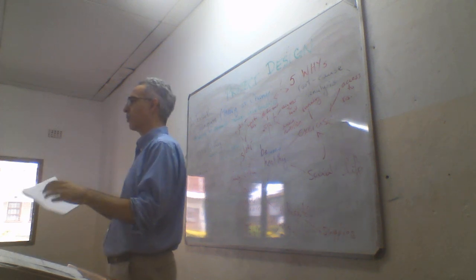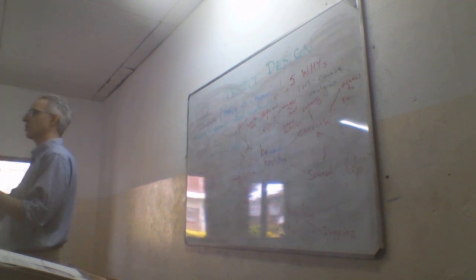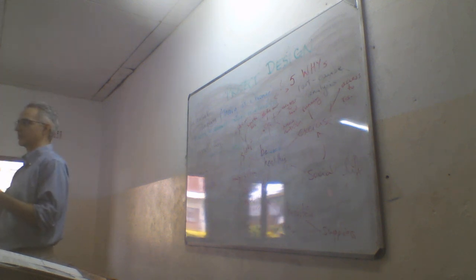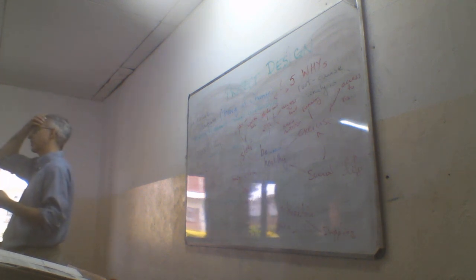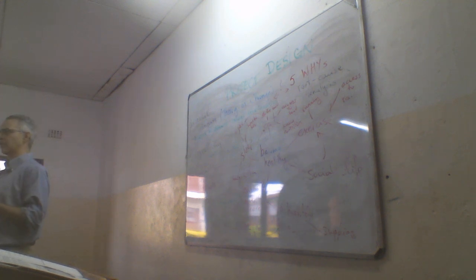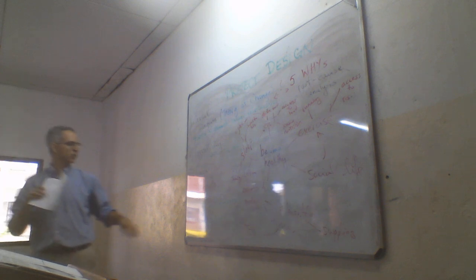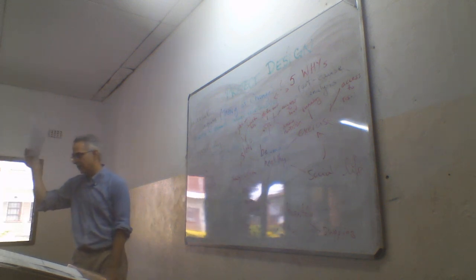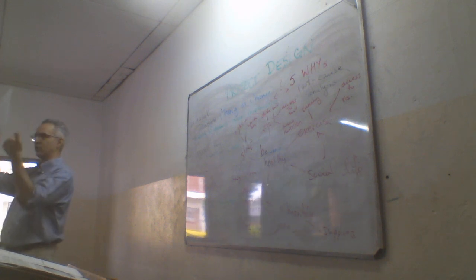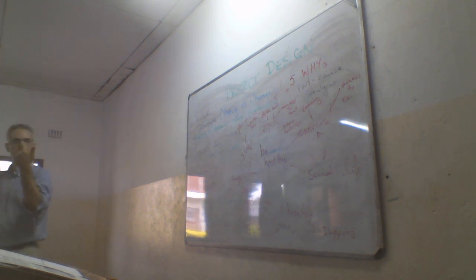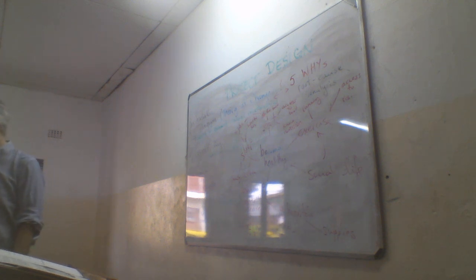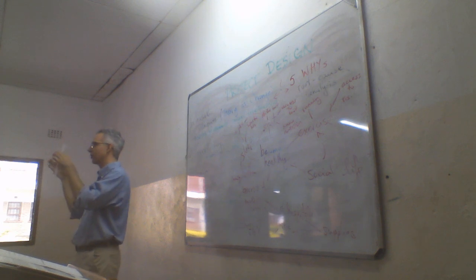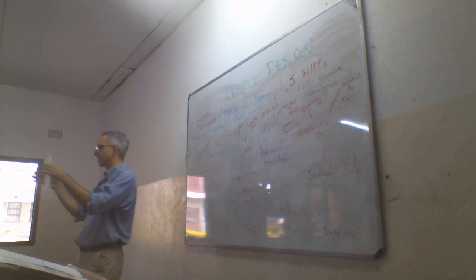Okay. So the way you get to a logic diagram, you don't start by building this. Every project proposal that is developed requires a diagram. In fact, the logical framework, which is this, plus it has numbers. What is the level of result you expect to achieve? And what is the effort required? What are the resources, the inputs, basically? That's what you're trying to end up with. This is basically your project proposal. That's how you do this.